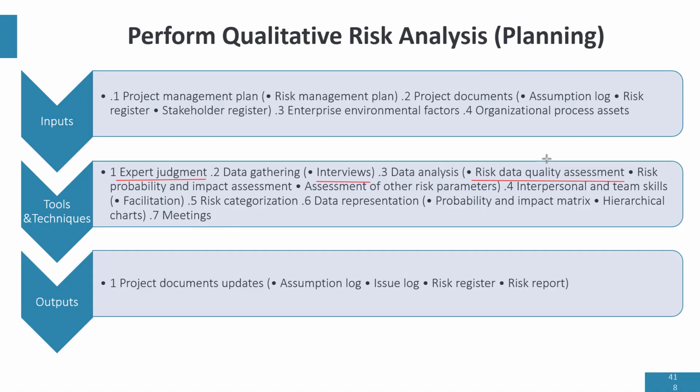I'll go back maybe 20 years on the 5th of April and get data on whether it rained or not. Let's say it rained 8 times out of 10 in 10 years, then the probability of it raining on the 5th of April will be 80%.